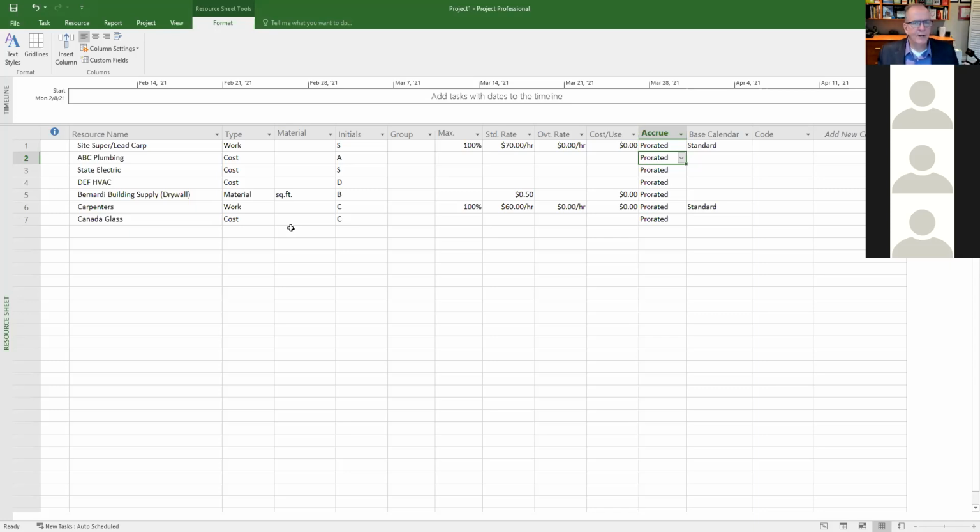But on the other hand, if I have a project that's going to take a year to do, and I have this set at the start, then that means I'm going to pay the site super for the whole project for their time on day one. If it's a year long and that site super earns 100,000 in the year, that means here's your 100,000 on day one, right? Probably not a good idea. Conversely, if I put this at the end, and that site super is there for the whole year, you got to work this whole year, and at the very end of the year, here's your 100,000. I doubt that's going to work either.